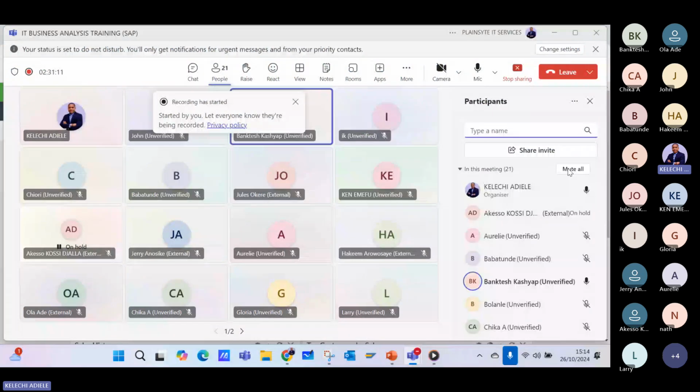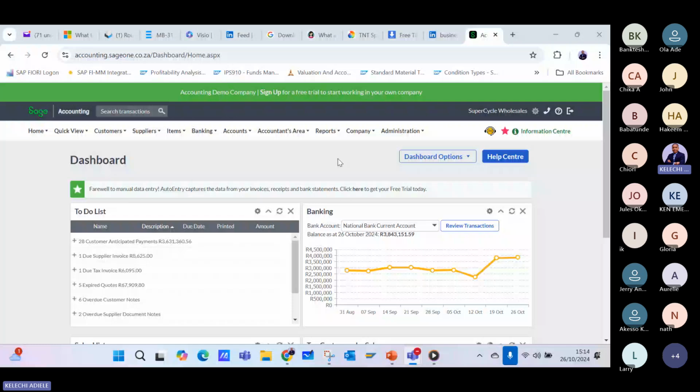So these are things that you need to actually do before you go into projects, right? You need to understand how this works. So you don't just send an email to any stakeholder. Before you actually start communicating, you need to come up with a communication plan. For this stakeholder, what kind of communication would he or she prefer? You need to come up with a stakeholder matrix to rank stakeholders according to their level of influence and power in a project before you even know how to approach them. So there is a lot that happens, right?